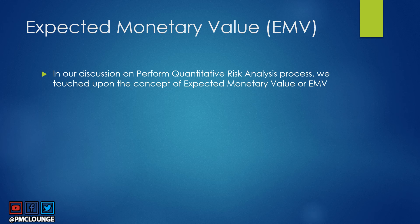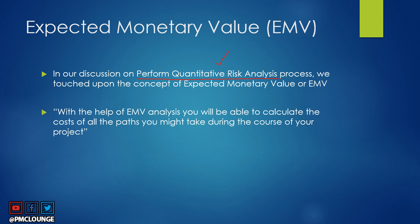Previously, when we discussed the Perform Quantitative Risk Analysis process, we touched upon EMV. With EMV analysis you will be able to calculate the costs of all the paths you might take during the course of your project. When we say paths, we're talking about how you're going to deal with risks — if a risk materializes, what path are you going to take and how much is it going to cost you.